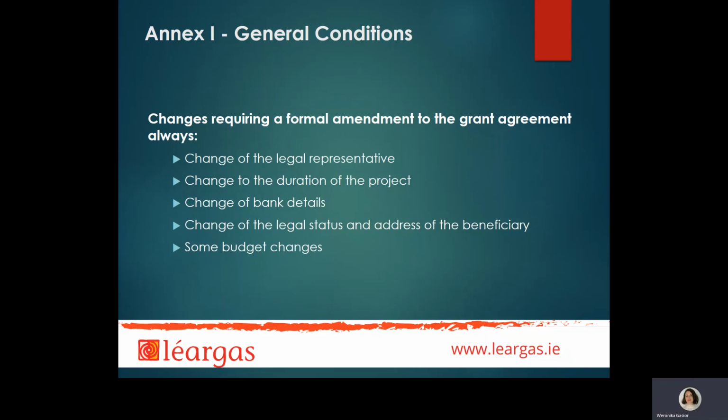There are several changes always requiring a formal amendment to the grant agreement, and these are, among others, change of the legal representative, change to the duration of the project, change of bank details, change of the legal status and address of the beneficiary, and some budget changes.